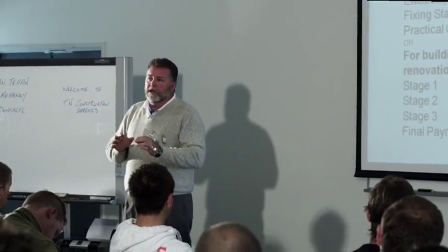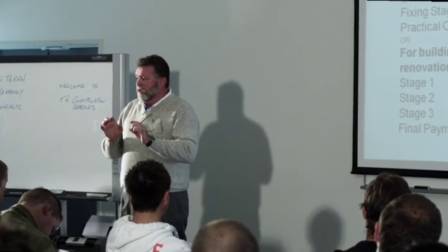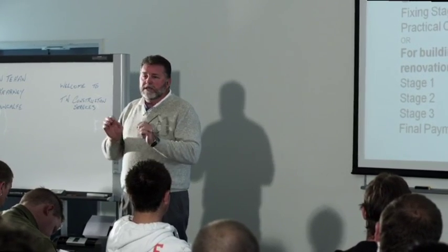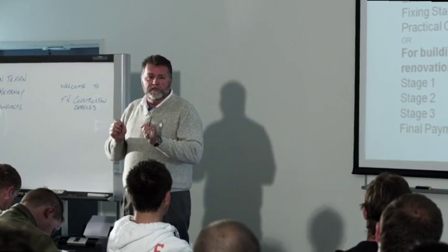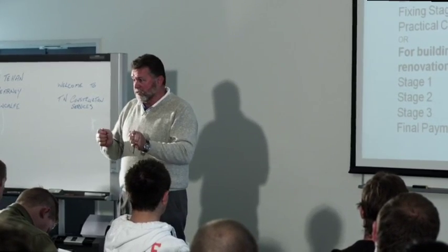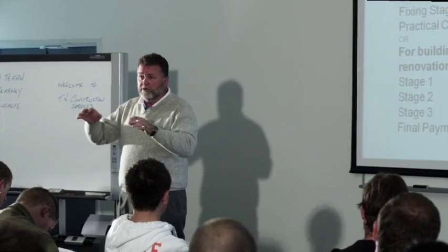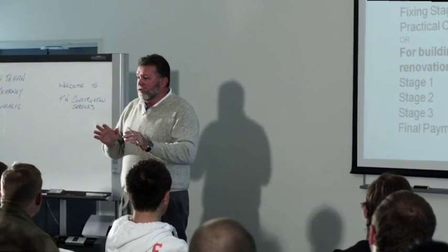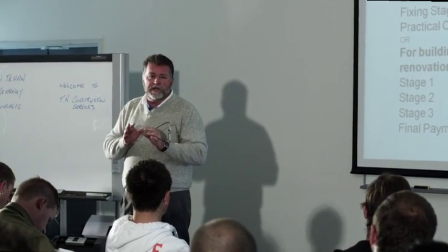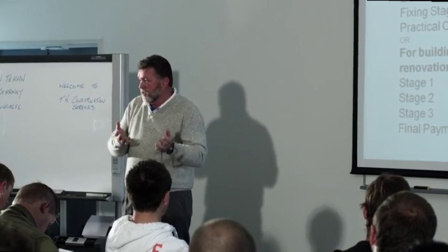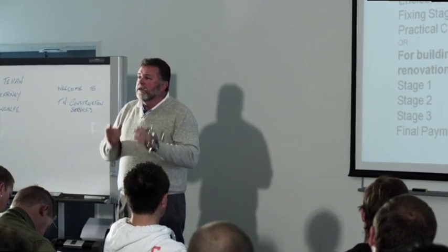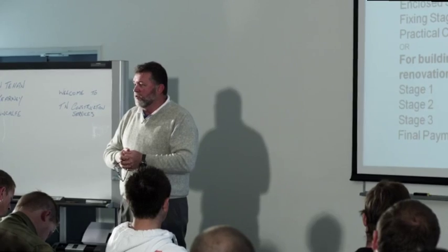So when you're looking at those types of things, the advice that we give is get your house removalist to site the building on his stumps. You've seen the blocks and everything they do, everyone's seen those? Get him to site it. Even if part of his work is to put in the stumps, the steel posts, whatever you want, then you come in and do your part of the work.